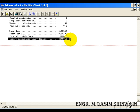But we are given the 28th February 2010. So to attain the 28th February 2010, we have either to increase the resources if possible or to increase the original duration of some of the activities which can affect the end date, which are known as the critical activities. Critical activities affect the start or end date or in some cases, both dates of a project.